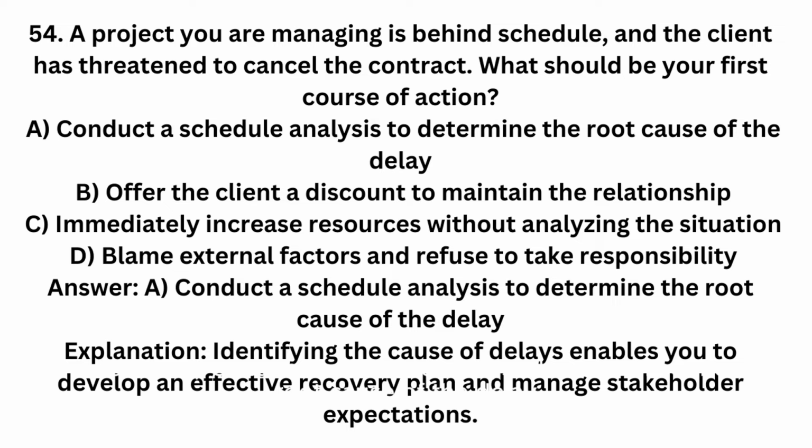Answer: conduct a schedule analysis to determine the root cause of the delay. Explanation: identifying the cause of delays enables you to develop an effective recovery plan and manage stakeholder expectations.